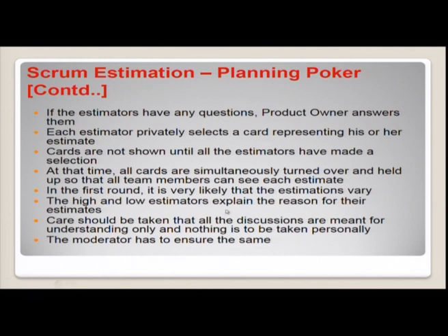The high and low estimators should explain the reason for their estimates. Care should be taken that all the discussions are meant for understanding only and nothing is to be taken personally. The moderator has to ensure that the estimates are becoming common. Now, these are some of the benefits of planning poker. One is expert opinion, another is analogy, third is disaggregation. Based on experience, you can estimate well and you get better estimates.